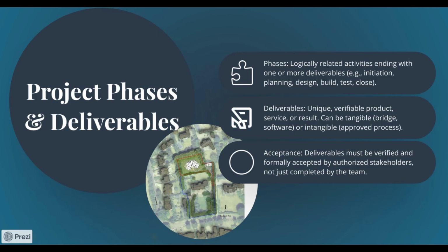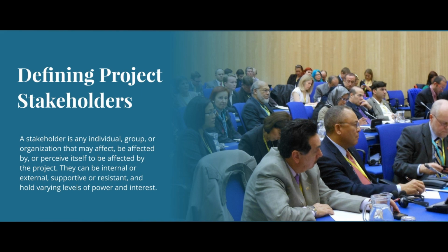A key point for PMP is this: deliverables must be verified and accepted. It is not enough that the team says the work is done. The customer, sponsor, or authorized stakeholder must accept the deliverable according to the agreed criteria. Now let's move to stakeholders.